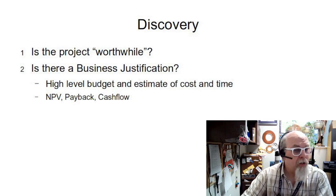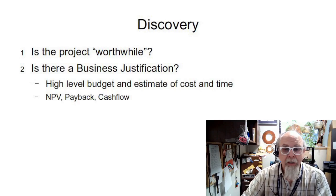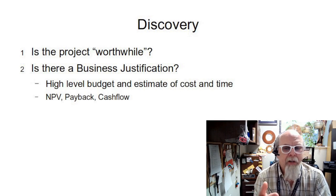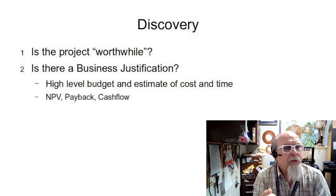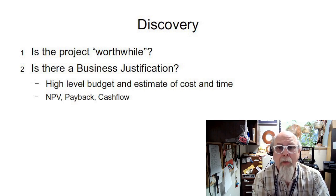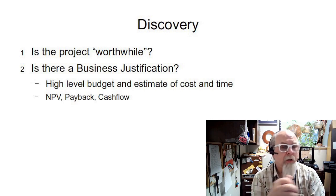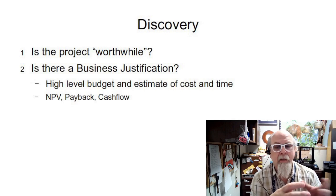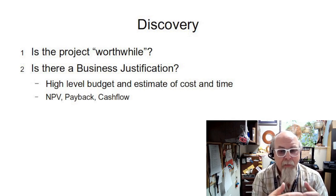In chapters one and two, we're going to talk a lot about the discovery phase. The thing we have to ask ourselves: we've got a project — somebody's brought us a project, we're talking about maybe doing it, it's not set in stone yet — but we have to ask some simple questions. Is the project worthwhile? Does it make sense to spend the time and money? What are the high-level cost estimates, what is a high-level budget, how long is it going to take? We should also look at calculating the net present value over time so we can compare alternatives more equally, and look at payback, cash flow, and other concepts as we're discovering the project. We've not yet jumped into creating the project, but we're trying to decide: are we even going to do it?